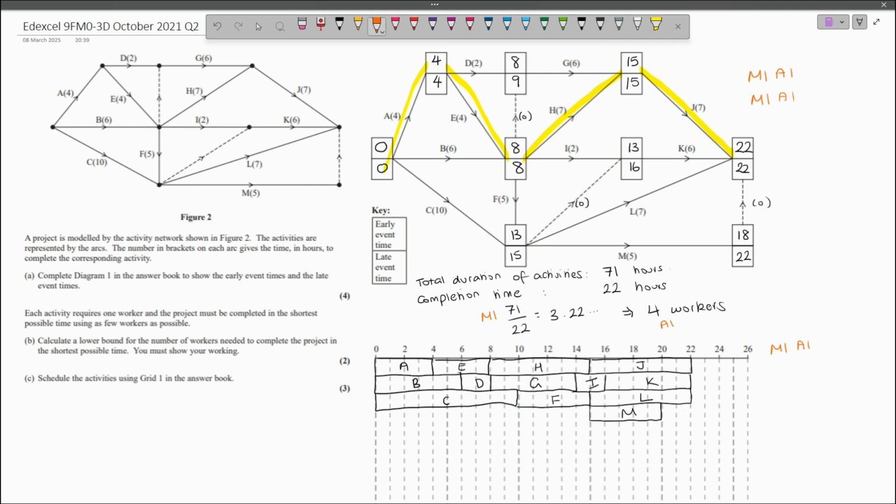And an activity can give rise to at most 3 errors, 1 on the duration, 1 on the time interval, and 1 on the immediately preceding activity. So by errors, if a duration of a task is wrong, that's an error. If the time interval that the task takes place in isn't realistic to complete the project by time 22, that's an error. And if the immediately preceding activity of, say, J, which is G and H, aren't complete by the time J begins, that's an error. You can only have 2 errors for this accuracy mark.